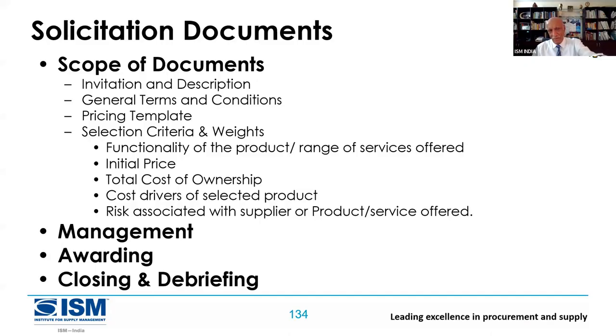Invitation and description. So you're looking for a transformer, say, guys, we are looking for a company who can help us in the transformer construction work, fabrication work. General terms and conditions you have, very correct. Pricing template, how do you want the price? Do you want a lump sum price? Do you want splitting of the price? So the pricing template, you will have to decide.